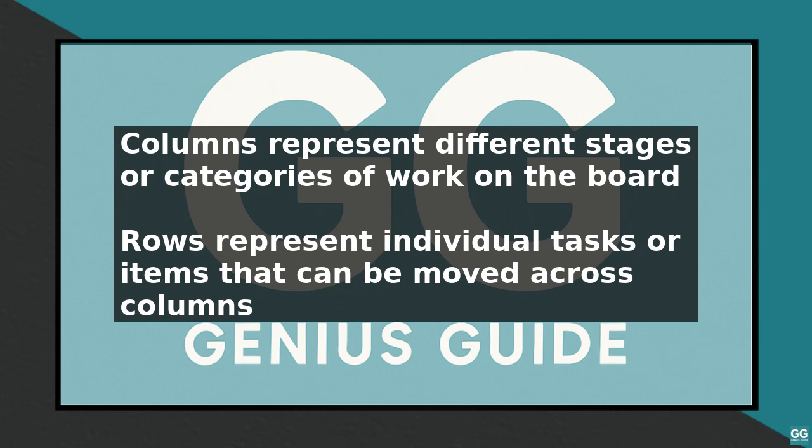Another important concept on Monday.com is the concept of workflows. Workflows represent a series of automated actions that can be triggered by specific events or conditions on your board. For example, you can set up a workflow to send a notification to a team member when an item is moved to a certain column.